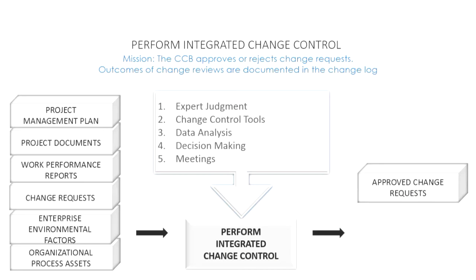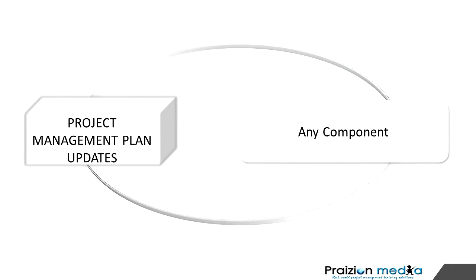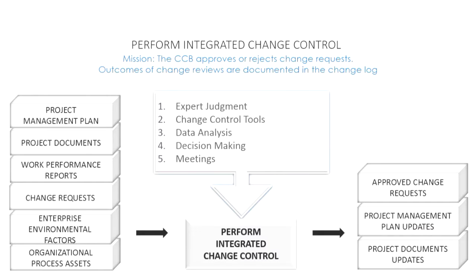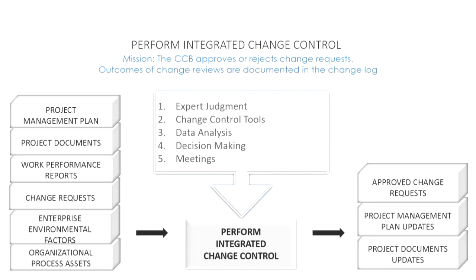Let's take a look at the outputs. The first is approved change requests — as you review change requests, you're either approving or rejecting them; those approved are called approved change requests. Next is project management plan updates, referring to any component of the plan that needs updating. Last is project documents updates, which contains a very important sub-output: the change log. It's not called out specifically, but it lives inside project documents — when you think about this process's outputs, the change log is the big one.